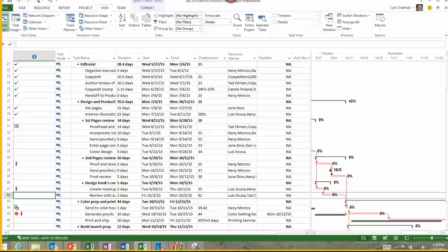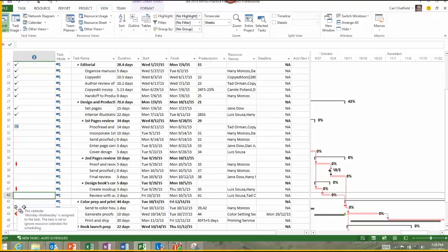It's a task calendar. But what I'm really saying is this kind of work, I don't want it to occur on a specific date, but I want it to occur on just certain days of the week. I don't know or necessarily care what week it may be, but for that week it has to be a Monday, Tuesday, or Wednesday. That was the thinking. Really, the only scenario I can think of where a task calendar is the answer. But I'm sure there are many of those. It just doesn't come up very often.